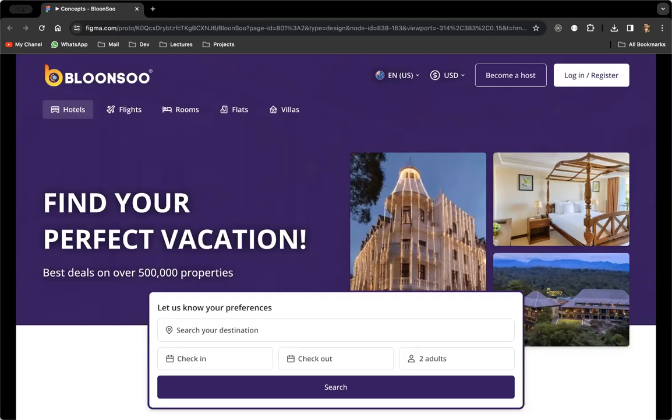The second thing is the cost. Cost will be affected because we initially estimated our tasks, our designs and everything based on what we see in the application. So if you're changing right now, then there's going to be a problem. So we will not accept that kind of changes. If you are saying, okay, this should be changed, there will be cost assigned to it. As I mentioned earlier, it can go either way. The cost might go up. Sometimes the cost might go down if you are cutting down any requirement or something like that.